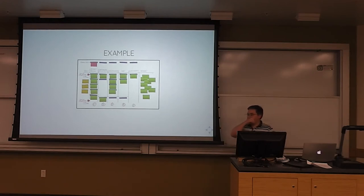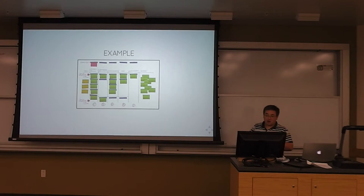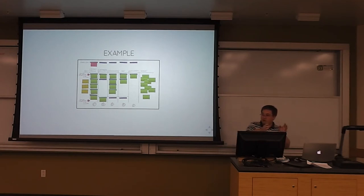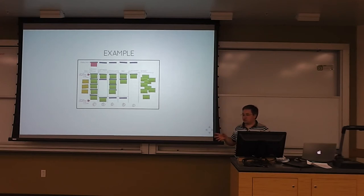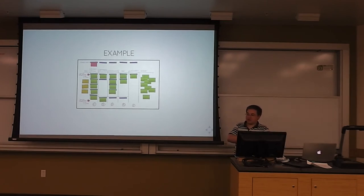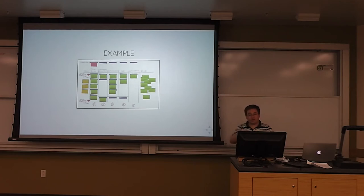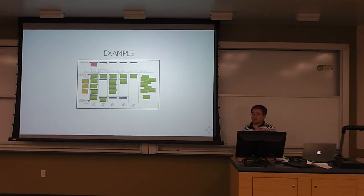On the question of whether the WIP limit is an absolute max or a minimum — it depends on what you want. On one Kanban board we use every day, we have both a max and a minimum. We don't want fewer than one task in progress per developer, but no more than two on average. When people work on too many things at once, they all slow down — too much context switching. But we also don't want anyone not working on anything. That's usually a sign they haven't updated the board. At a glance, you can see which tasks are where.